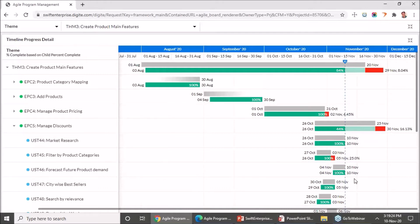Actual start can be based on either the earliest timesheet actual start date for that work item, or the date by which it has moved into an in-progress column. One of the enhancements in version 7.5 is that we have given you the ability to classify the columns on your value stream board as ready, in-progress, waiting, and done. The moment you move a card into in-progress, that will be considered as work having started on it. So if you are tracking purely based on card movement on the board and not relying on timesheet actual effort, you will still be able to derive an actual start with accurate percent progress computation.